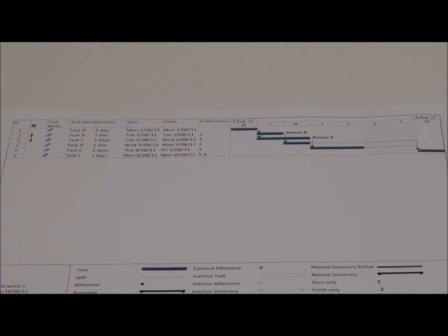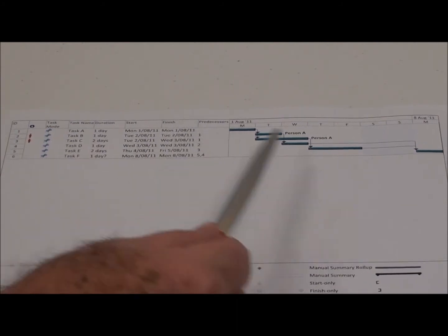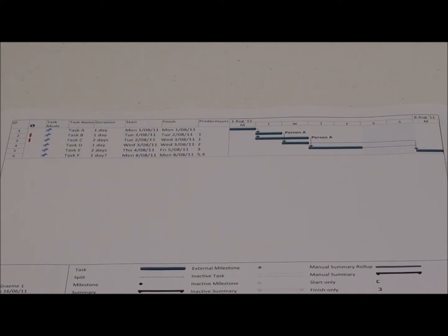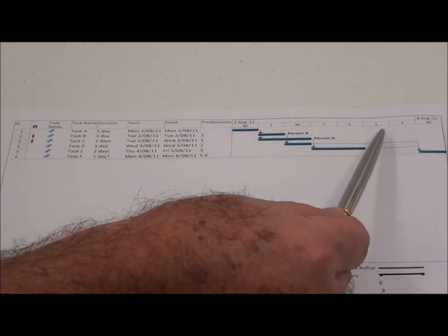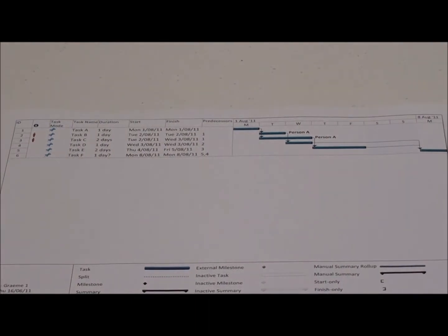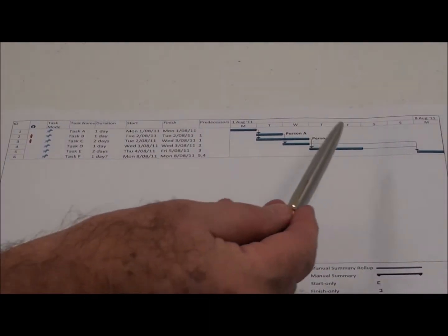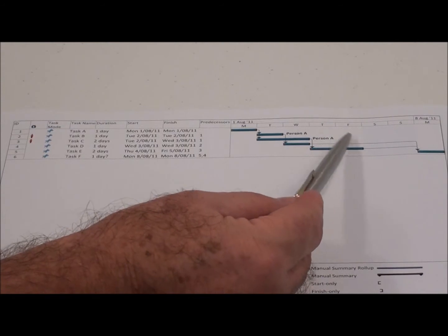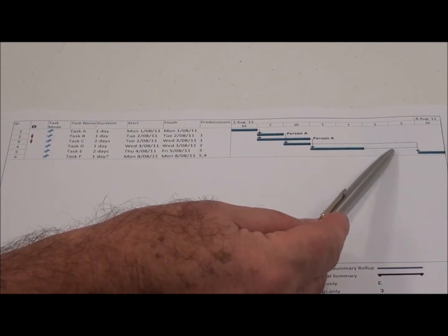The Gantt chart and the WBS table form part of our schedule of a project. This particular project has 6 tasks, and this shows the relationship of those tasks. We have calculated we start on a Monday and we finish on a Monday because we do not work Saturday and Sunday. However, that Saturday and Sunday are an option if any of these tasks extend by a day so that we can still finish on time.